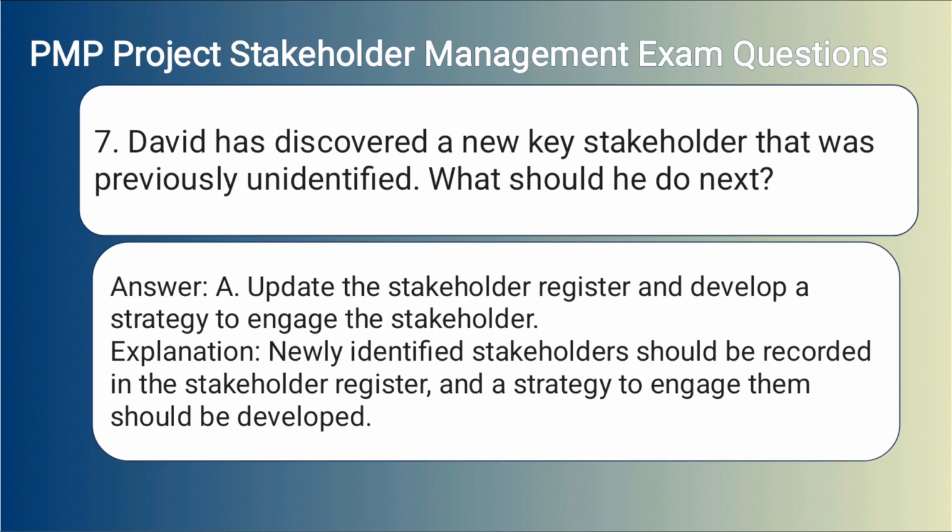Answer: A. Update the stakeholder register and develop a strategy to engage the stakeholder. Explanation: Newly identified stakeholders should be recorded in the stakeholder register, and a strategy to engage them should be developed.